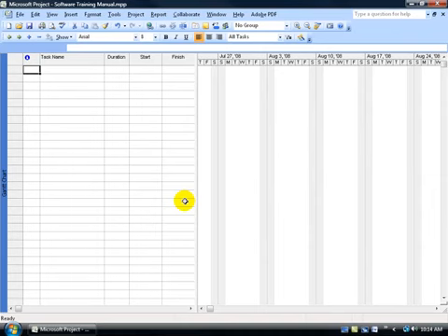Now one thing I want to warn you before we close out of this session is that when you start entering in your tasks and you're going through and you're making all these changes, remember you do have an undo button to undo your mistakes. Now I'm assuming that you've watched or you learned Excel or one of the other basic Office programs before you dive into Project. And if you have, again, you'll have your undo and redo buttons. So you can undo your mistakes or redo your mistakes. Now, when you click on the Save button, this undo will disappear. Unlike Microsoft Word, when you click Save, you can still undo your mistakes. So keep that in mind, that before you click on the Save button, make sure you're feeling confident with all the changes that you made.